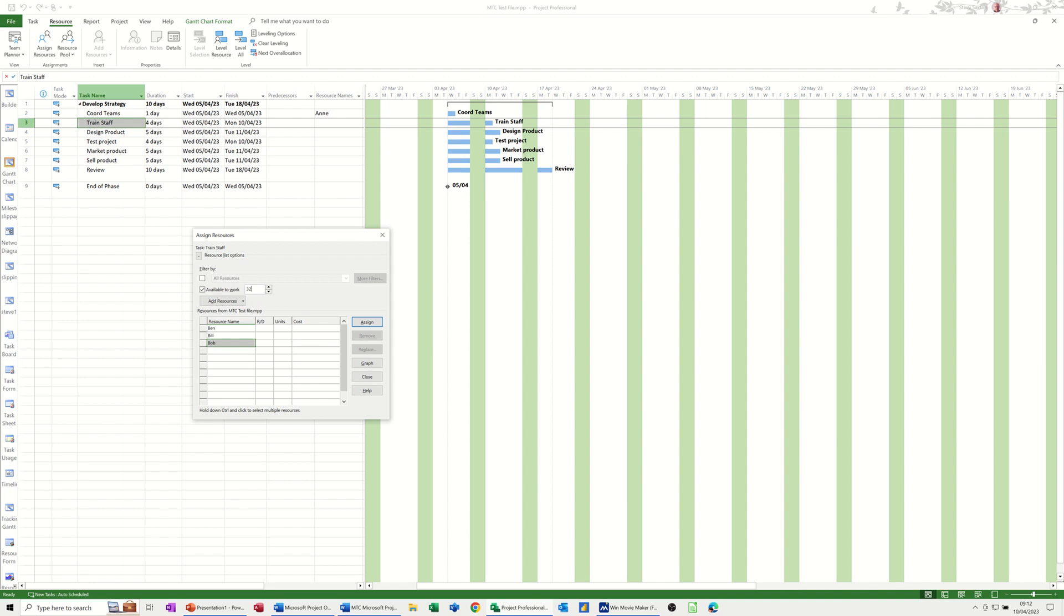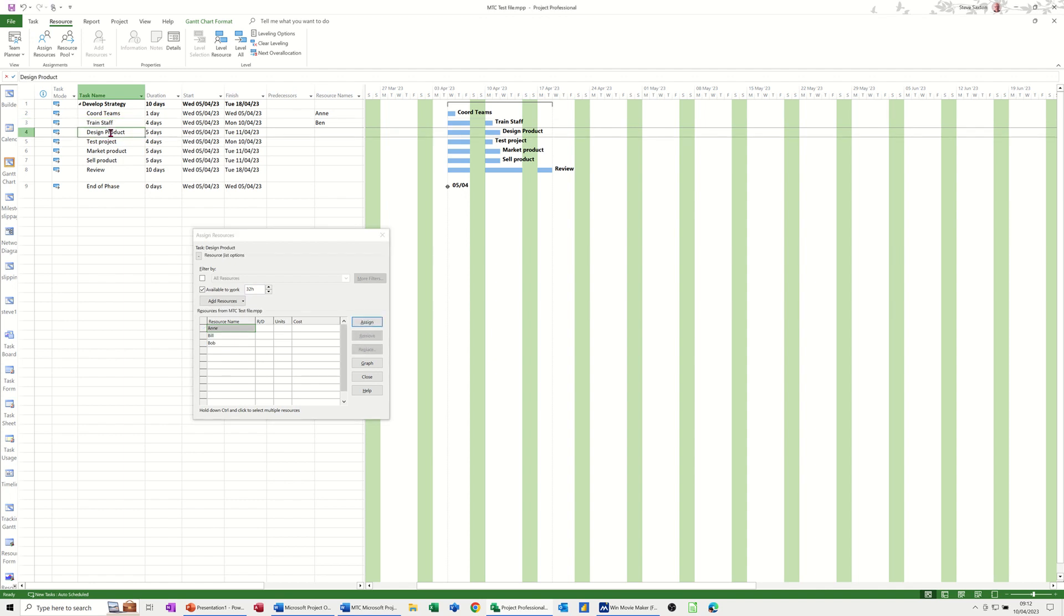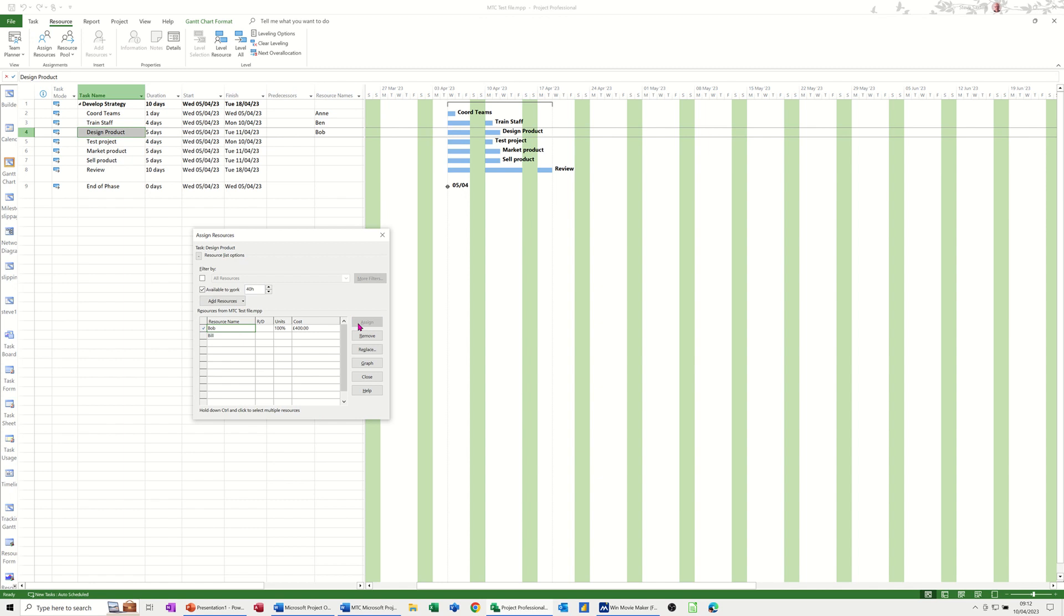Now the next task down is a five-day task. These are the people available to do 32 hours. Let's have a look at doing 40 hours for this one - Bill and Bob are available for 40 hours work, so I'll assign Bob.